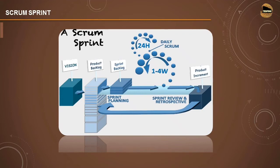The daily Scrum call is just like a stand-up meeting where all team members gather and the Scrum Master addresses the development team with questions. Generally there are three questions the Scrum Master asks every day: What did you do yesterday? What are you planning to do today? And are there any challenges or roadblocks you are facing? This happens every day for about 15 minutes, which is why they are called stand-up meetings.